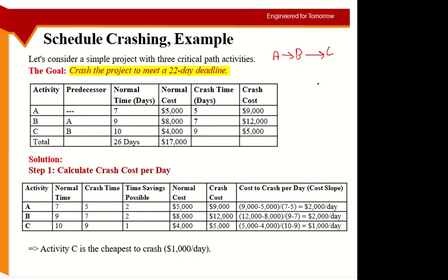But for that I don't have the data. Like I don't know what is activity A. Is it design? Is it concreting? What is it? So for fast tracking you must know that type of activity. If I just give you A, B, C, D, E, and I say do fast tracking, make them parallel, you cannot do that. So you need more details for fast tracking about the activity itself.